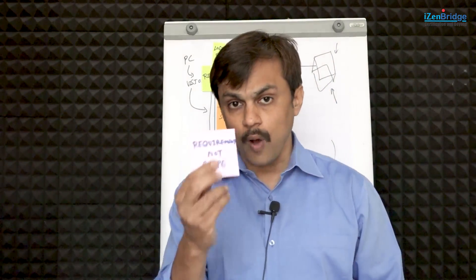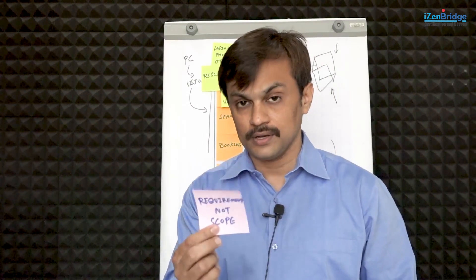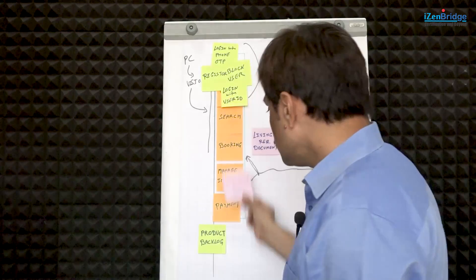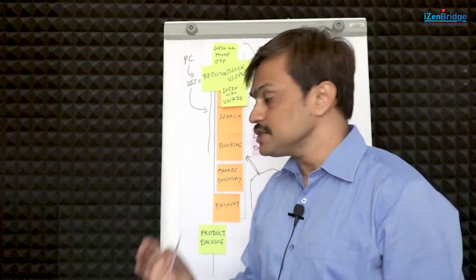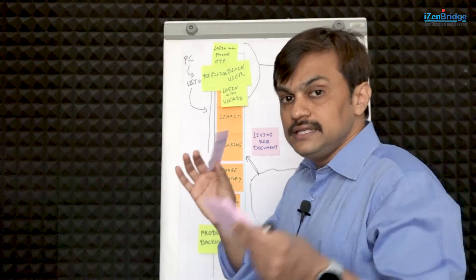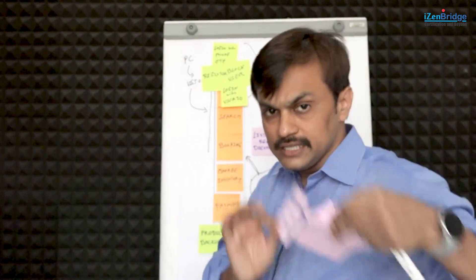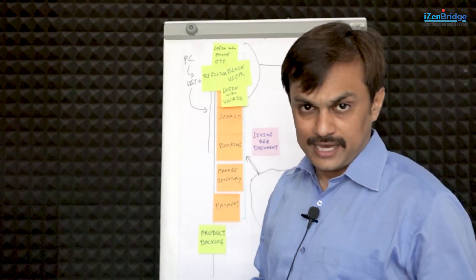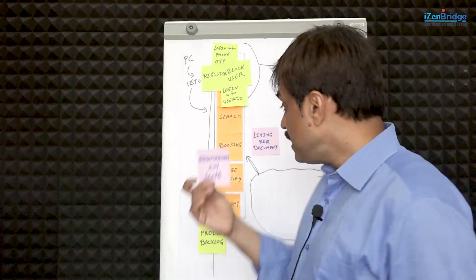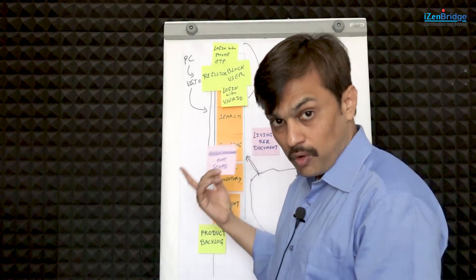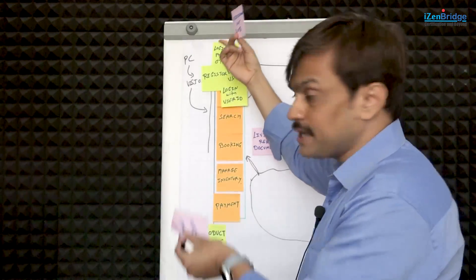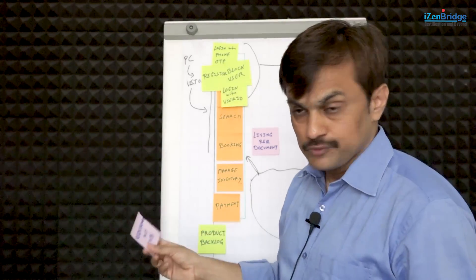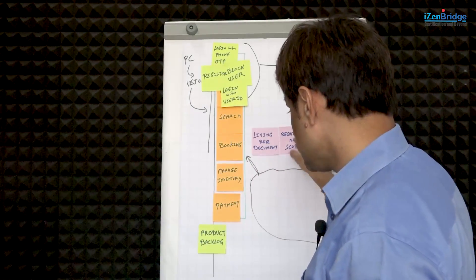It contains requirements, not scope — and for a project manager this is very important. The product backlog should be in the language of your end users. It is not in the language of implementation, not in the language of deliverables, not a solutioning language. It's a need language, a problem language, a benefit language. It contains requirements, and these requirements might be big or small. High-priority items expected to get done soon will become small; others might remain big.